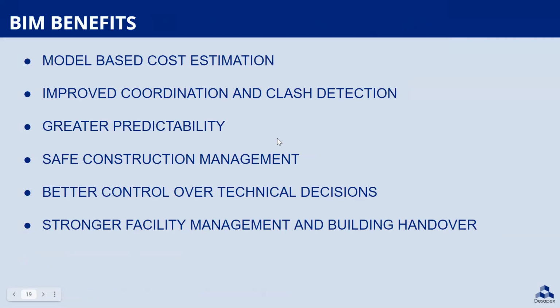So briefly, I'll just tell about some benefits of BIM. Model-based cost estimation. Using the various BIM tools, it enables automation of the time-consuming task of quantifying and applying the cost. This allows estimators to focus on high-value factors such as identifying the construction assemblies and assessing the various risks also.